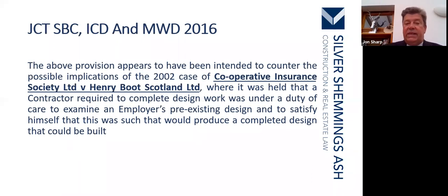JCT SBC, ICD and MWD 2016. That above provision, the one I just referred to on the previous slide, appears to have been intended to counter the possible implications of a 2002 case between the Cooperative Insurance Society Limited and HMRC Scotland Limited, where it was held that a contractor required to complete design work was under a duty of care to examine an employer's pre-existing design and to satisfy himself that this was such that would produce a completed design that could be built.